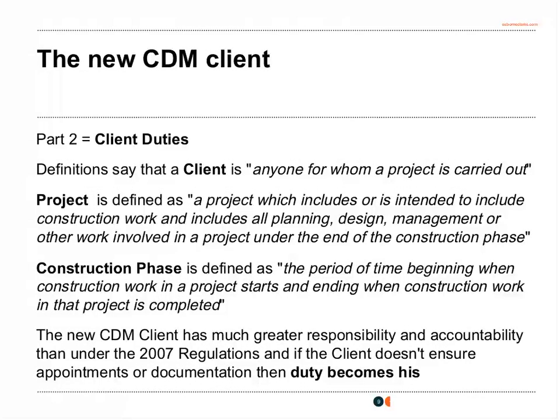Looking next, on the next slide, at the new CDM client role, there has been a general shift with responsibility onto the client under CDM 2015. We've already touched on the definitions of both project and construction phase, but the client is the person who is at the top of the chain and for whom a project is being carried out. The appointments that the client needs to consider will be those such as principal designer and principal contractor, and it's important to note that those appointments need to be made in writing.